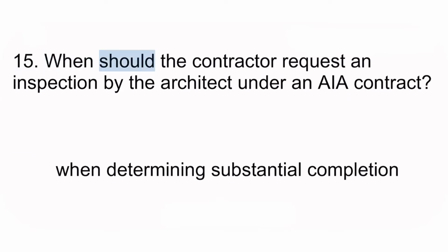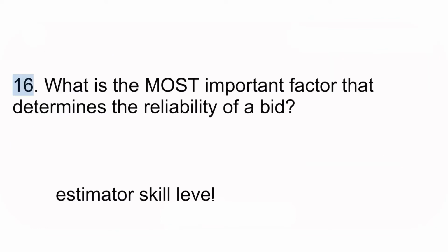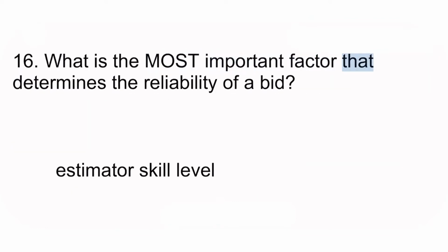15. When should the contractor request an inspection by the architect under an AIA contract? When determining substantial completion. 16. What is the most important factor that determines the reliability of a bid? Estimator skill level.